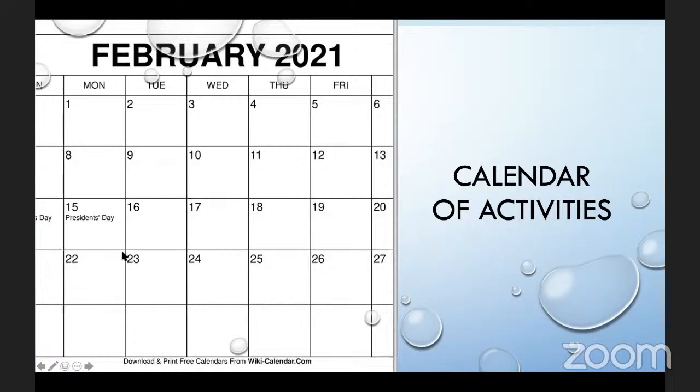So typically on the first day of the new sprint, that's on the 15th, in the afternoon, there might be a time on the calendar where the retrospective meeting is going to happen. The idea is that you want to learn as much as possible from the previous sprint once you kick off a new sprint. Sometimes some people even have it in the morning, so right from the sprint planning and kickoff, they dive into their retro session, so that they can learn lessons from the previous sprint. But the idea is that you need to have it as early as possible. It must not go beyond the Tuesday of the new sprint that has just kicked off the previous day. So on the 15th or the 16th, the retro meeting must happen, okay?